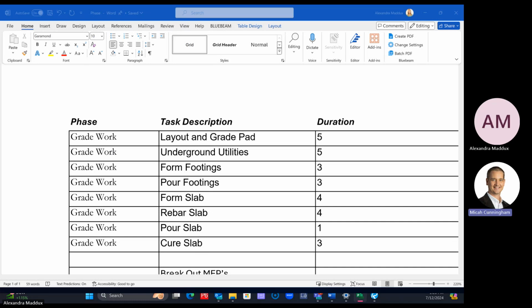Are we tying logic yet? Not yet. So the start date didn't update. You have your manual schedule on, because you had the push pins on it. If you change those to auto, then it'll have at least dates with the durations. But the dates themselves won't change until you have the logic, if that's what you mean.